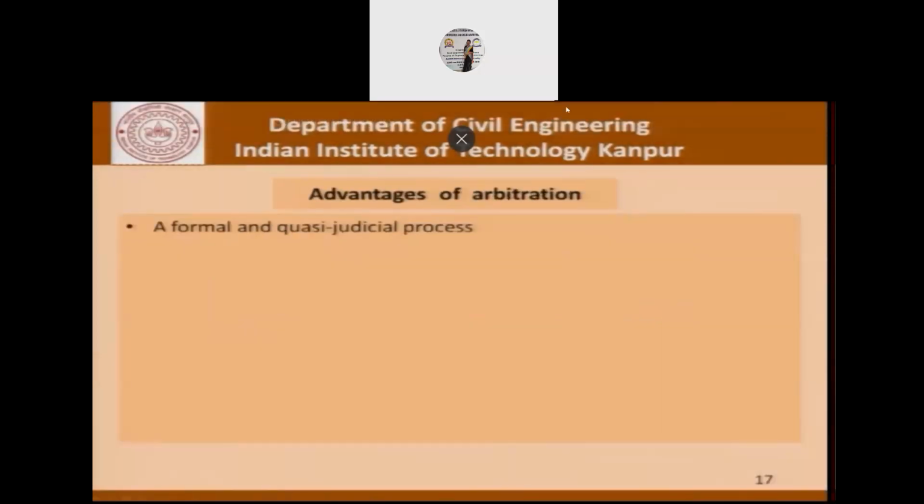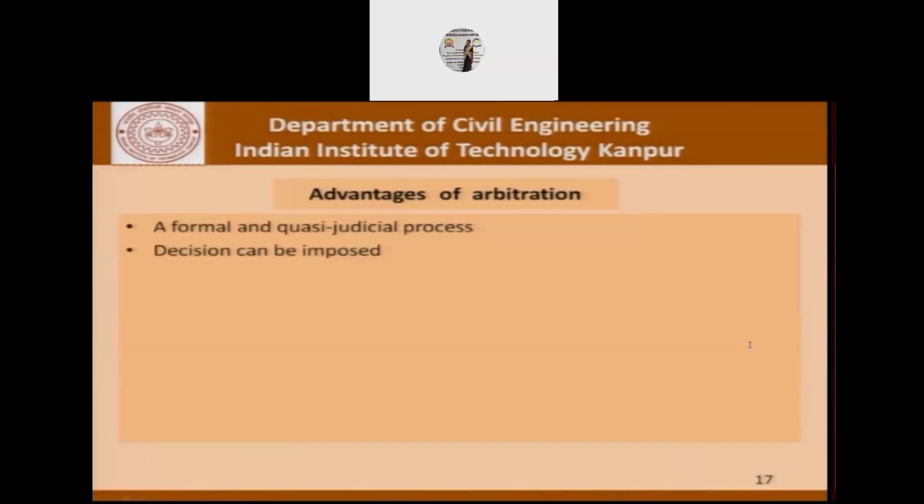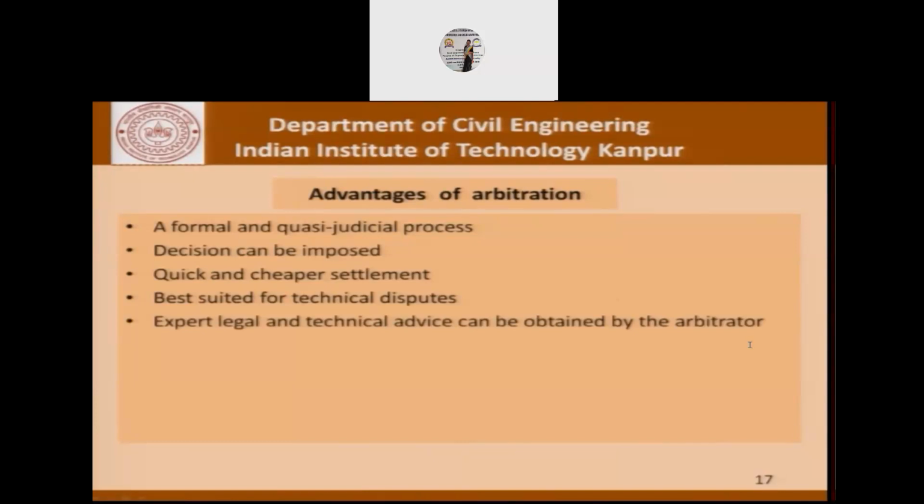As far as arbitration is concerned, it is a formal post-execution process. Decisions can be enforced and are legally binding. It is quick and cheap, heard and resolved by persons having knowledge. Expert legal and technical advice can be given by the arbitrator.